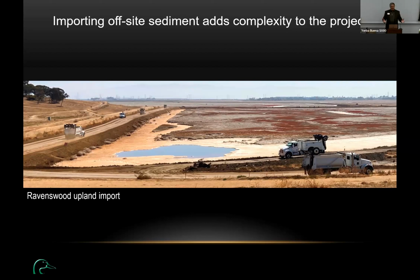Almost every site, I'd say probably every site, has material that will not meet our screening criteria. So unless you can segregate the site at some point, you're not going to get any material. And then if you do get the material, the test results go to an independent reviewer, a quality assurance officer, that looks at the material. If they think it meets it or if it's close, they might send it to a third-party reviewer, and then that goes to the water board and BCDC for their evaluation review. That all takes time, and sometimes we've lost material just because the source site wasn't patient enough to wait for that process to go through. So there's a lot of challenges with that.